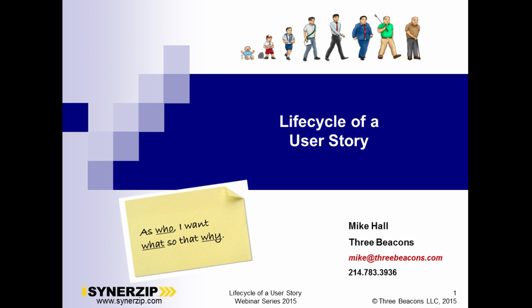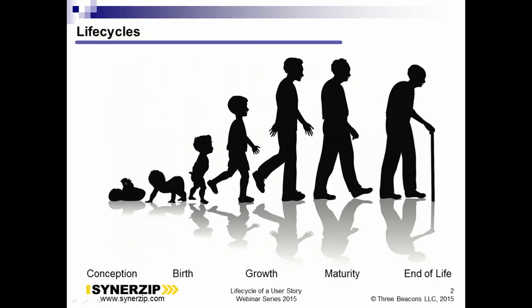It's a good way to kick off your project. Hold those discussions where you're talking about the project vision and the ideation of it, and come up with the user story names. The user story is the decomposable work unit that we want to get to in our agile projects. User stories are those that require stimulus from the user — the user can be human or not, it can be a user of your system, or another system like an upstream processor or downstream data mart.